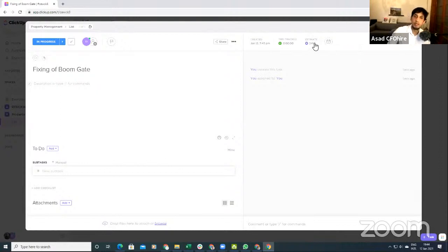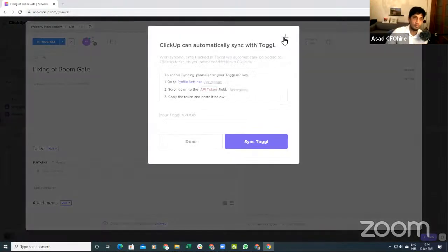In ClickUp, it asks you what is a day. So a day might be 8 hours. You have 8 hours in a day of working days. So if you put 3 days, it will show 24 hours. So you just have to take a look at that. Okay.